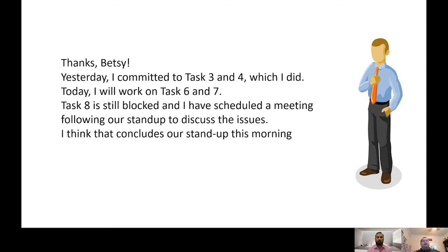Thanks, Betsy. Yesterday I committed to task 3 and 4, which I did. Today I will work on task 6 and 7. Task 8 is still blocked, and I've scheduled a meeting following our stand-up to discuss the issues. I think that concludes our stand-up this morning. So this person has a blocker, which is being scheduled for discussion right after the stand-up.